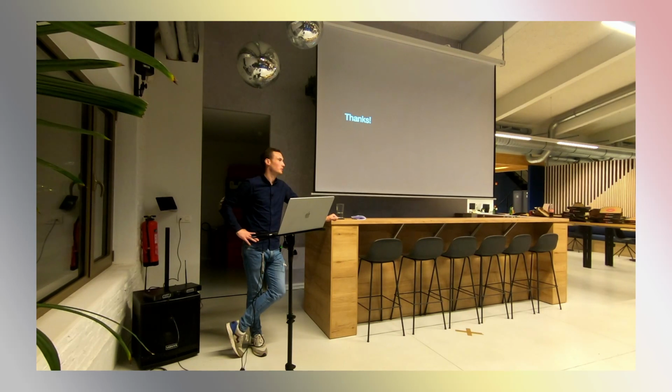Velocity is just so we can make an offer to clients. Because if you don't have a global velocity, then you don't know how long it will take, what the budget will be. But I think after 1 or 2 sprints, we see, okay, this is the velocity for this team, for this project, and then we can plan ahead.